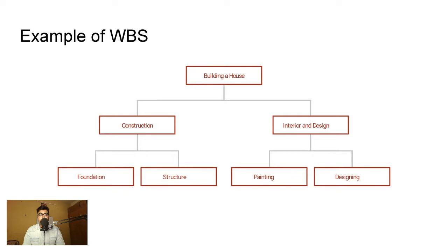Let's take this example, building a house, which is further divided into construction and interior design. So, though building a house is your entire project objective, construction would be one part of it, and the other part of it would be interior and design. Now, you can further break down the construction into foundation and structure, whereas you can also break down the interior into painting and designing. I know we can still go ahead breaking down foundation into a couple of things, structure into a couple of items, painting and designing as well into a couple of items, and further as well.